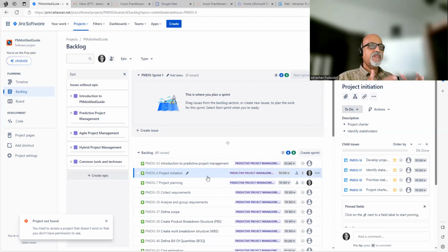When we start, we should at least have some degree of confidence with respect to the minimum viable product. And once we have sufficient confidence in this, then we can get into release planning. That means we can define the earliest sprints, which will end up in the earliest release to the customer.